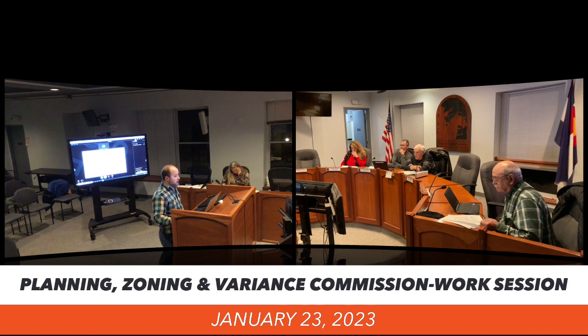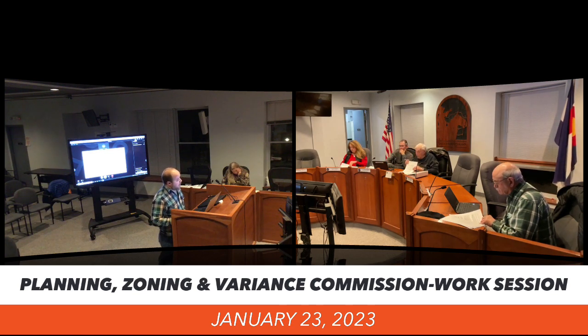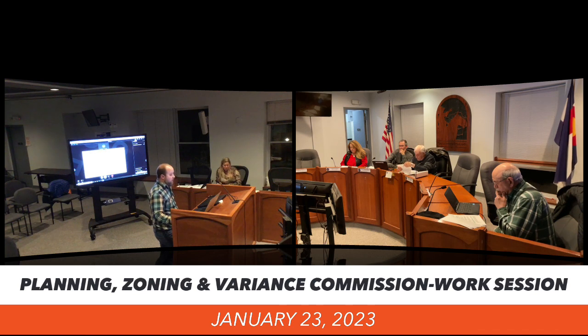to the city council. At that point, under number seven, the city council either affirms or reverses your decision. And then they can file their plats and their final development plan. So at that point, they have 60 days to file plats, etc., and get going. Now, if they have actual infrastructure they're doing, they will need to, again, before any issuance of occupancy or acceptance, they'll need to actually provide as-builts.